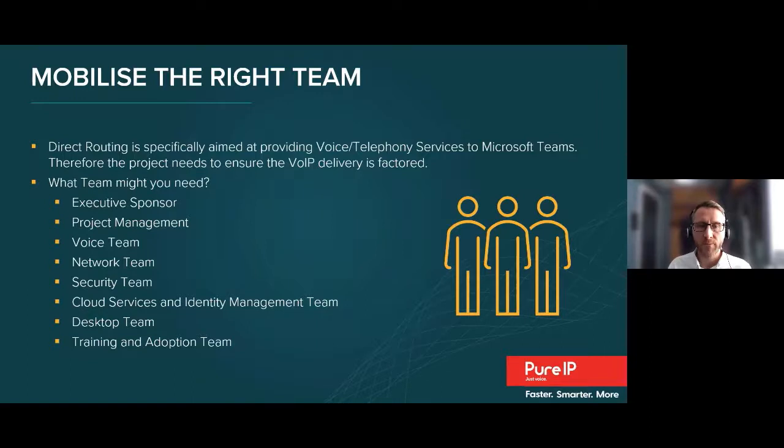Another role within Phone System and direct routing projects will be to factor training, adoption and change. Make sure training and knowledge needs are assessed early on and built into the project plan. So having a representative on board within the project team from the start is essential. A lead in this area can be involved in the user profiling and then bring that understanding through into the training plans. It's obvious to train the users of the service, but also consider the technical teams and what they might require to manage the new solution.